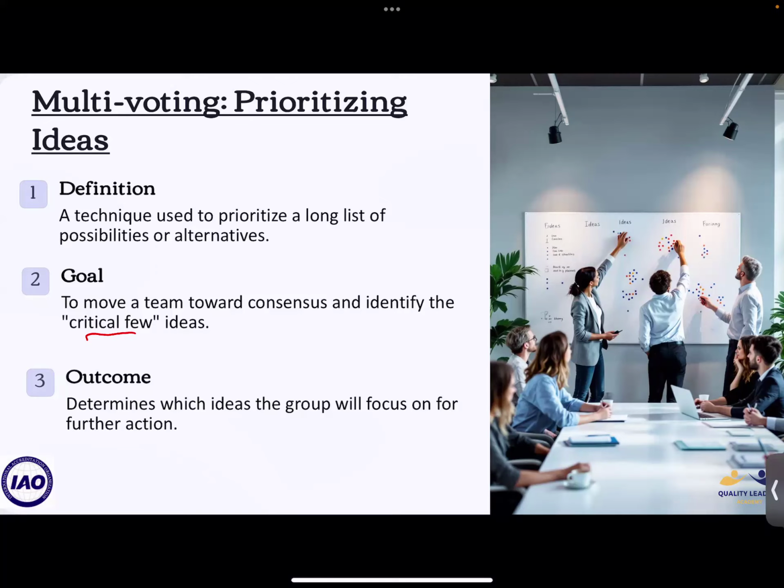For example, if you have a lot of ideas and you want to prioritize them, or you have many problems and you want to prioritize them, we start by giving each one a vote. How many points should we give this problem? So, for example, give it 10 points. How many points should we give this idea? Give another idea 20 points. Another idea gets a different score, and so on. We vote to narrow down the number of ideas.